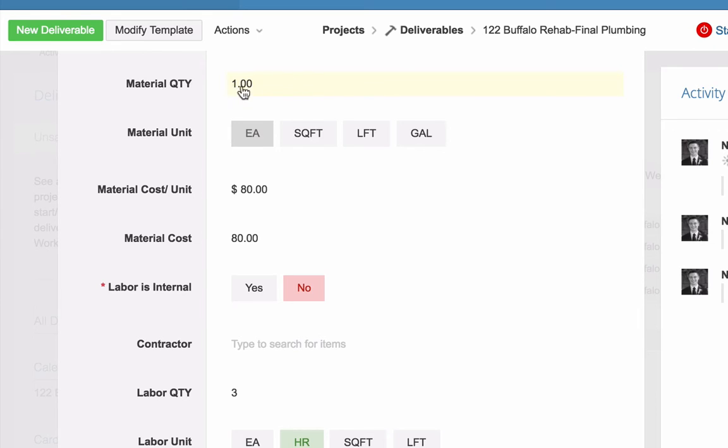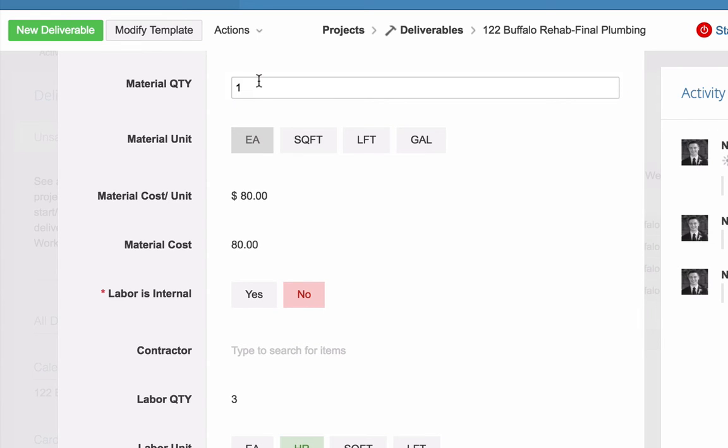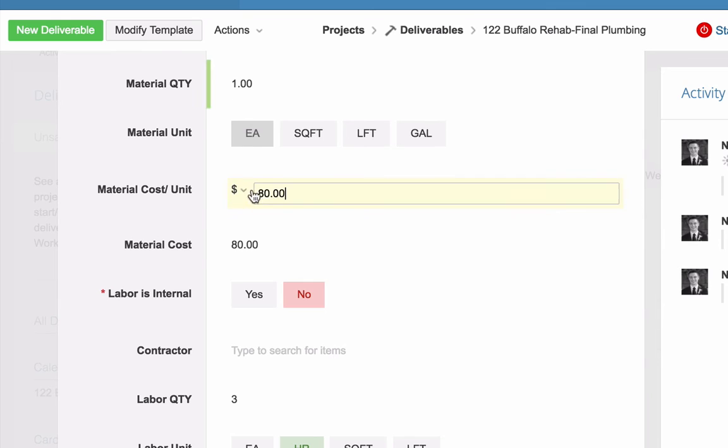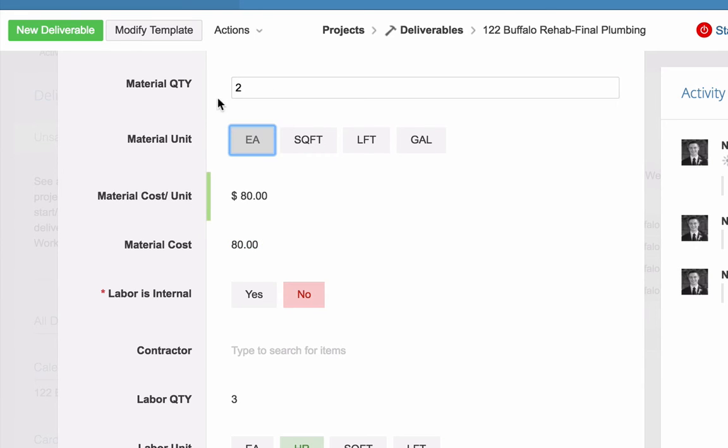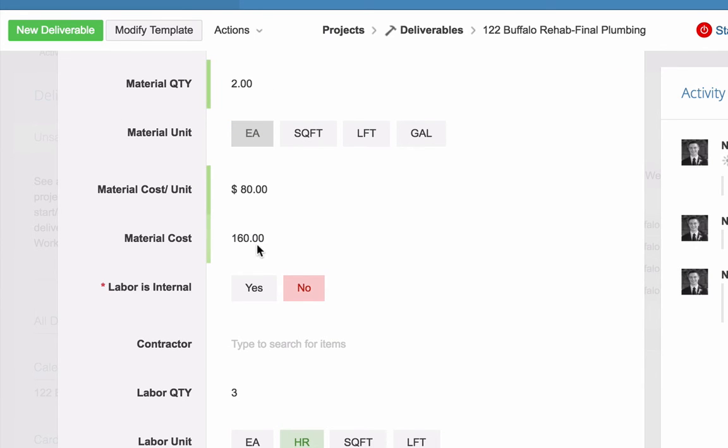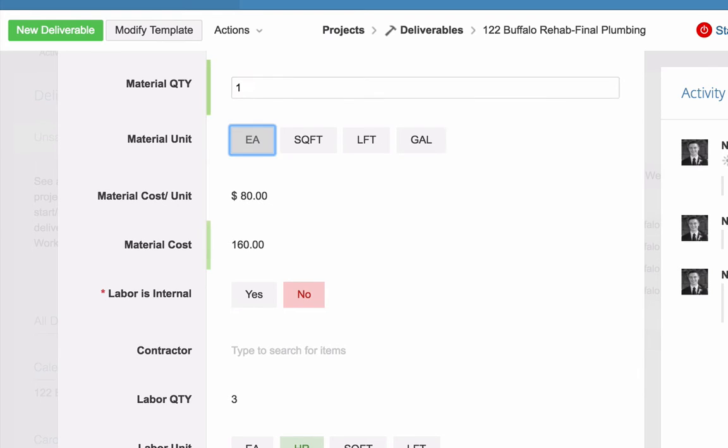So as you're inputting into your deliverable, you say the material quantity, what is the material quantity per unit? And we calculate the material costs. We don't enter that, that calculates. So obviously if I put two here, material costs going to go up to 260. Okay. Very simple calculation.